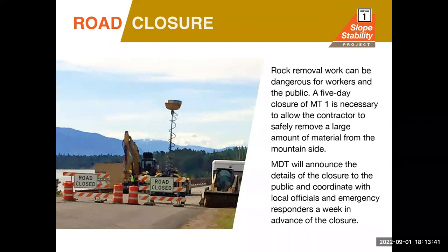The anticipated time frame for the 5-day closure is expected to be in early October. The contractor's schedule is not finalized right now, so those dates might move a little. It might be a little earlier than the beginning of October. It might be a little later than the beginning of October. As that time approaches, we'll let everybody know.